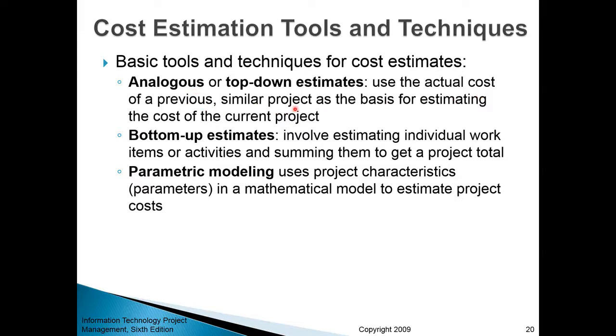project, right? So you can do some research either internally within your organization to find records about prior projects, or somewhere externally, meaning you can search some industry reports, consulting reports, to see how much it costs to do certain activities within a project. And then based on those estimates, you will say, well, last year we did this and we spent X amount, this year because of inflation and because of the greater magnitude, we're gonna spend 1.5x on the same task that is a part of a different project.